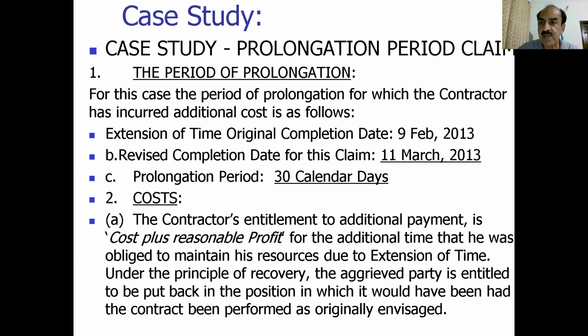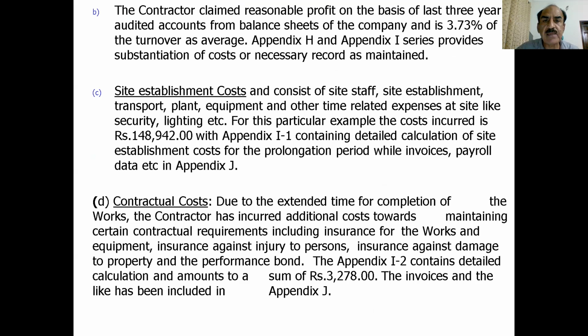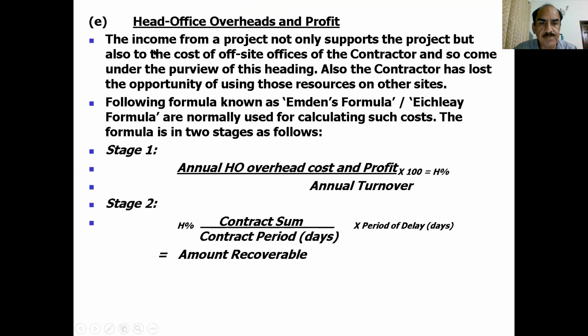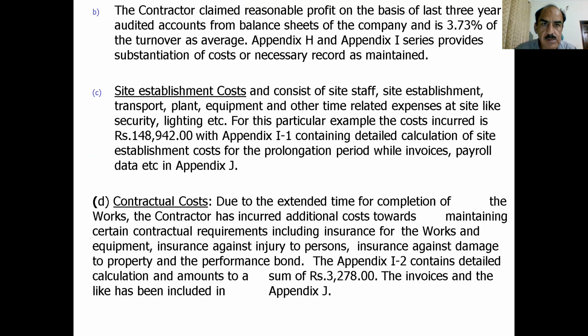So any changes in the prices, the contractor claimed reasonable overheads on the basis of the last 3 years' audited accounts from the balance sheet of the company, and that is 3.73% of the turnover on average. Appendix H and I series provide substantiation of the cost and necessary records.